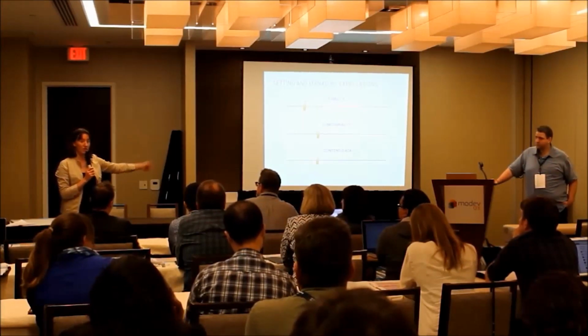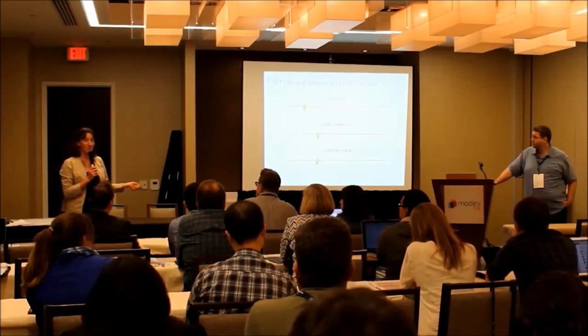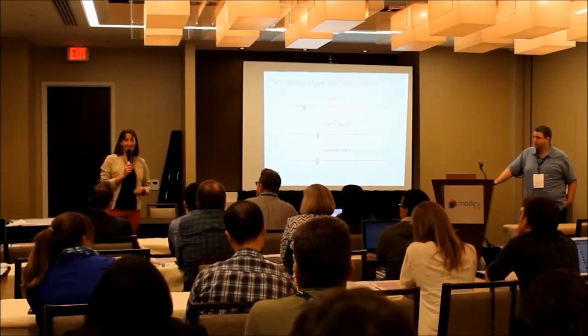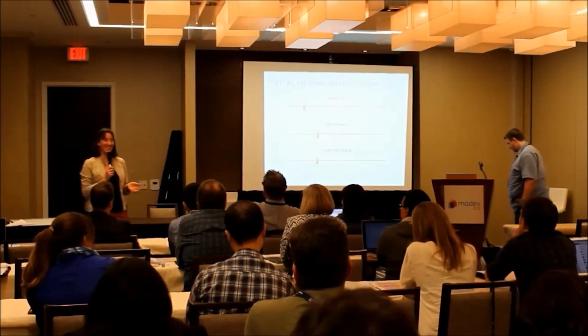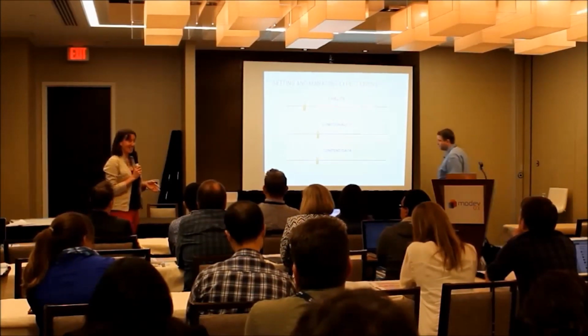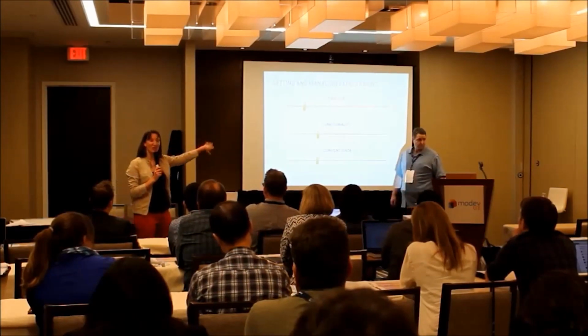And we draw it on the board. They usually start with something and it's like, that's great. So are we adding more people and time to this project? Or are we sticking with our initial scope and timing, and then we might have to renegotiate.